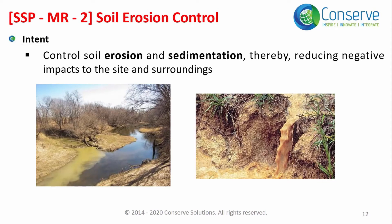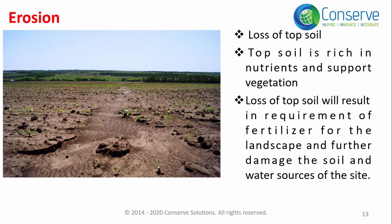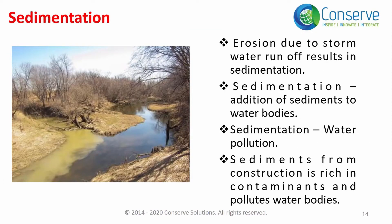The next mandatory requirement is soil erosion control. The intent is to control erosion and sedimentation and thereby reduce negative impact to the site and surroundings. Erosion is a loss of topsoil — topsoil is rich in nutrients and supports vegetation. Loss of topsoil results in requirements for fertilizer for landscaping and further damages soil and water sources. One of the main reasons for erosion is stormwater runoff, which results in sedimentation — the addition of sediments to water bodies — and is a form of water pollution.